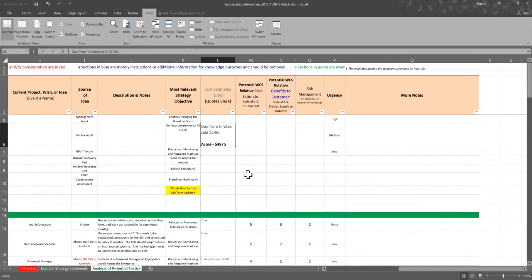And then I already said that, we're never going to really be able to know truly what something's going to cost until we get down to the nitty gritty of the negotiation. But we should be working in worst case scenario cost information as we start analyzing potential tactics. And so my approach, or what I would recommend, is that we first of all distinguish between, is the cost merely, and I'm putting air quotes around the word merely because we can get into a lot of trouble if we think that time is merely something. But is the cost merely time, or is the cost time and money? If the cost is time and money, have we got at least a worst case scenario quote, or can we at least give a ballpark allowance based on a quick Google search or whatever?